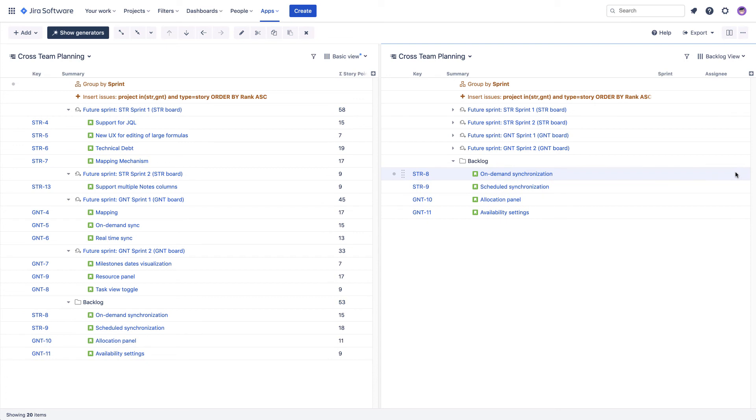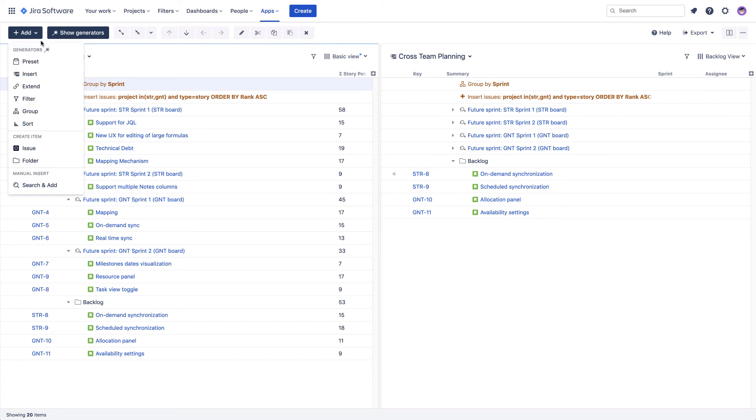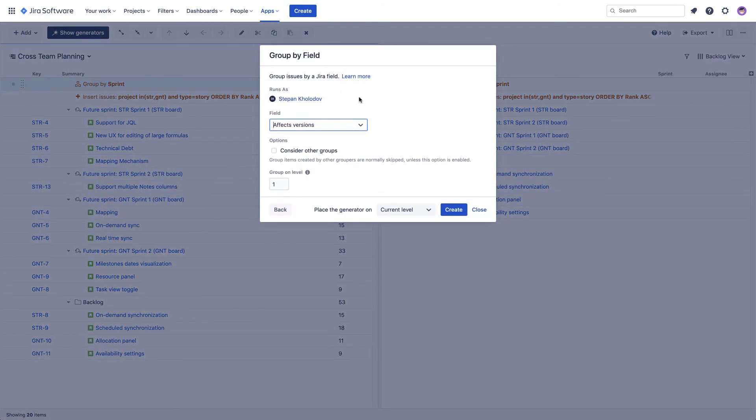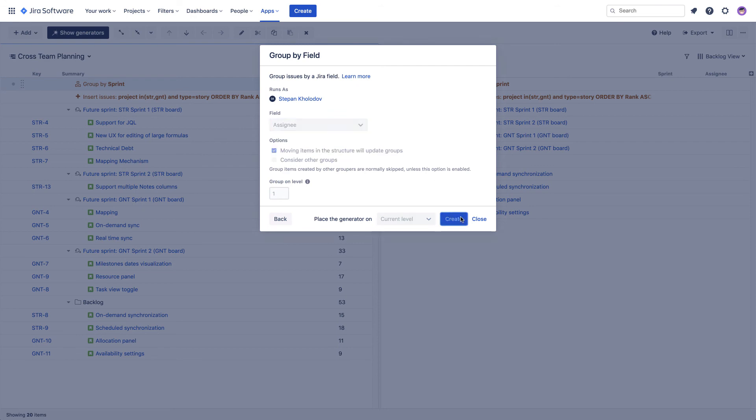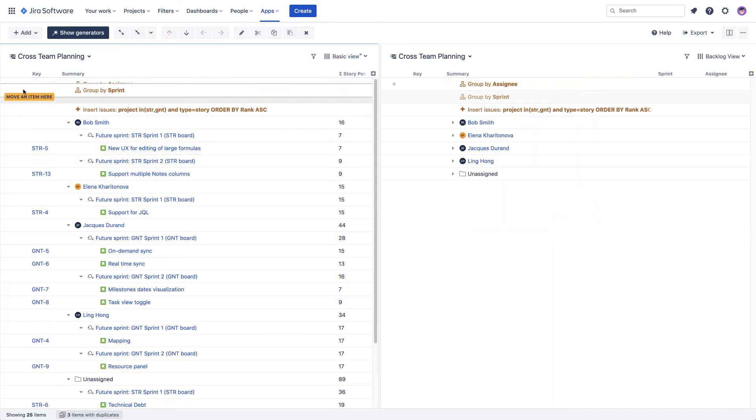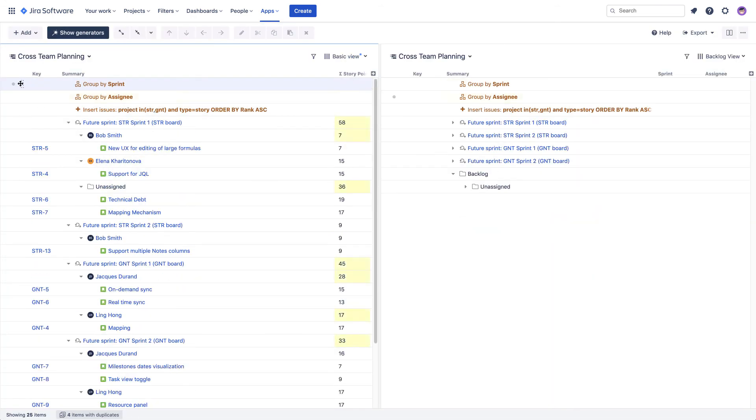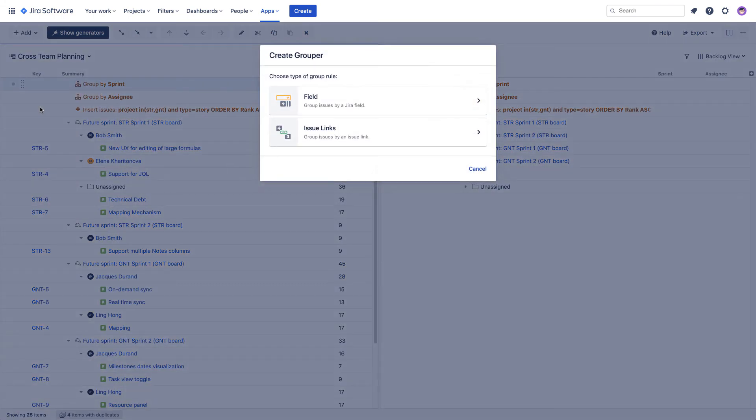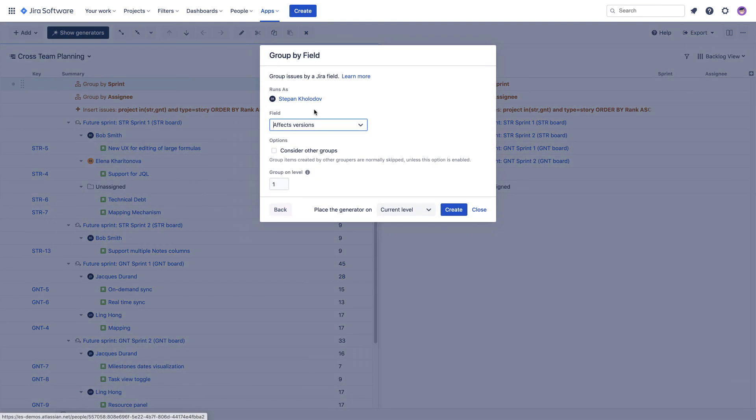If you want to go a level below and check the work allocation by team members, you can add another level of grouping and see if anyone is overbooked. You can also go a level above and see how much work is planned for each release.